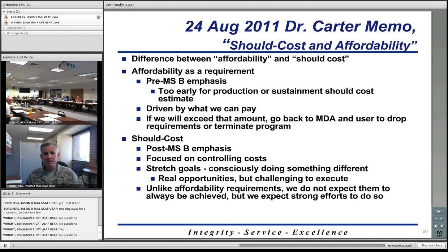This is where, as you may recall, we talked about the presidential helicopter being canceled and then it's being brought back. This is the principle that it's being brought back on. How much capability can we afford? What happened previously, prior to it getting canceled, cost estimates tended to go up, but the capability, if you look at the history of what capability they were asking, it kept going up and up and up, essentially maybe gold plating it.